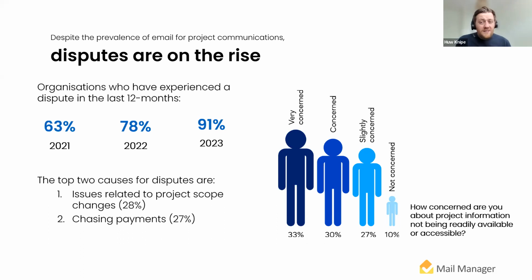A shocking 12% of these changes do not reside in a digital space at all, and 11% of respondents highlighted that the only place they are kept is in a project manager's head. In 2020, pre-COVID, this was 6.2%, which shows an alarming increase of AEC firms not formally recording project scope changes in the past 3 years.